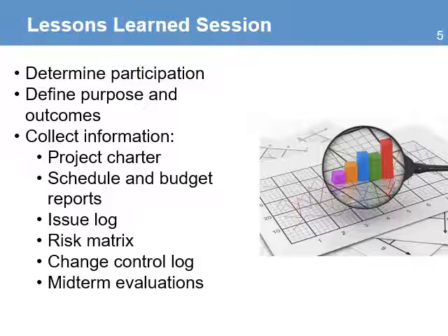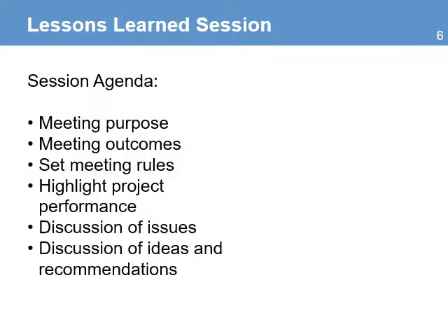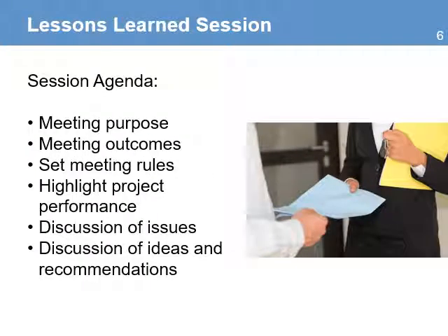The information can include the project charter, the schedule and budget reports, the issue log, the risk matrix, the change control log, and the project midterm evaluation report. With that information, you then need to create the agenda. You will need to make sure that the purpose is clear and that the outcomes are well defined. You also need to set some basic meeting rules.